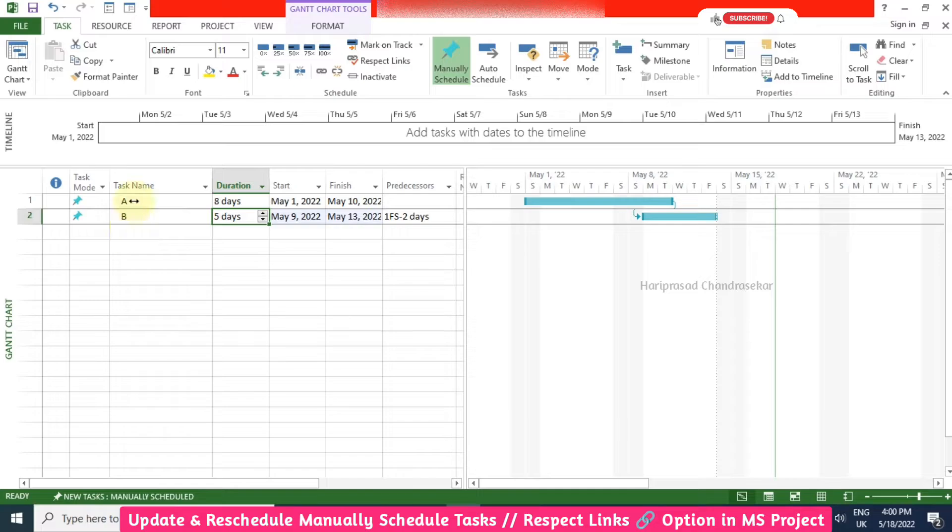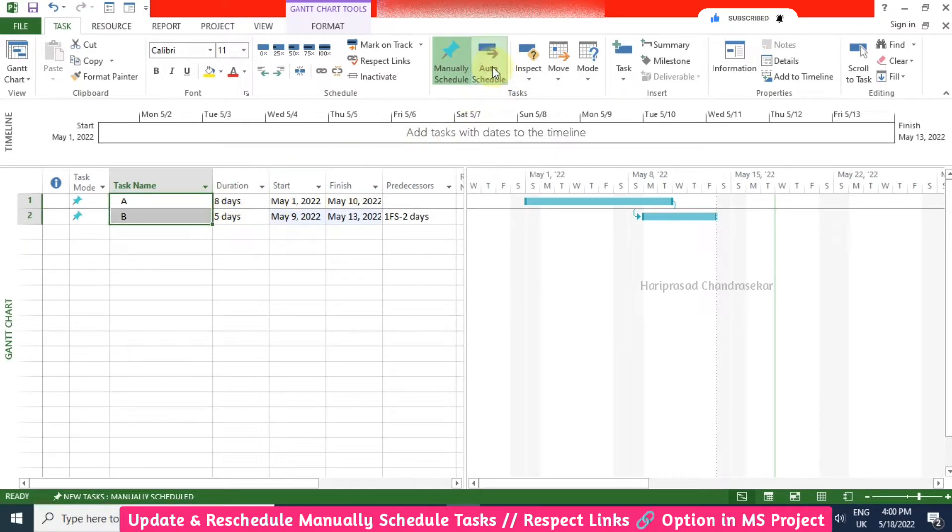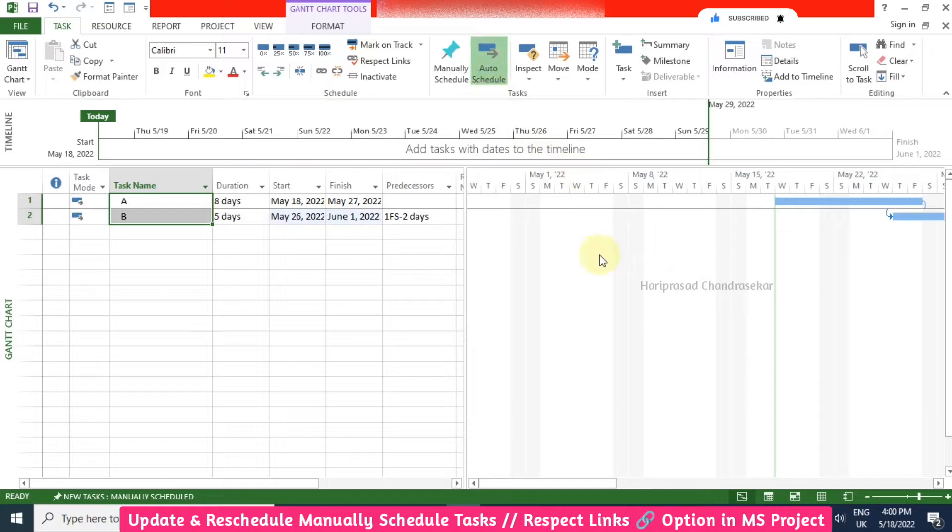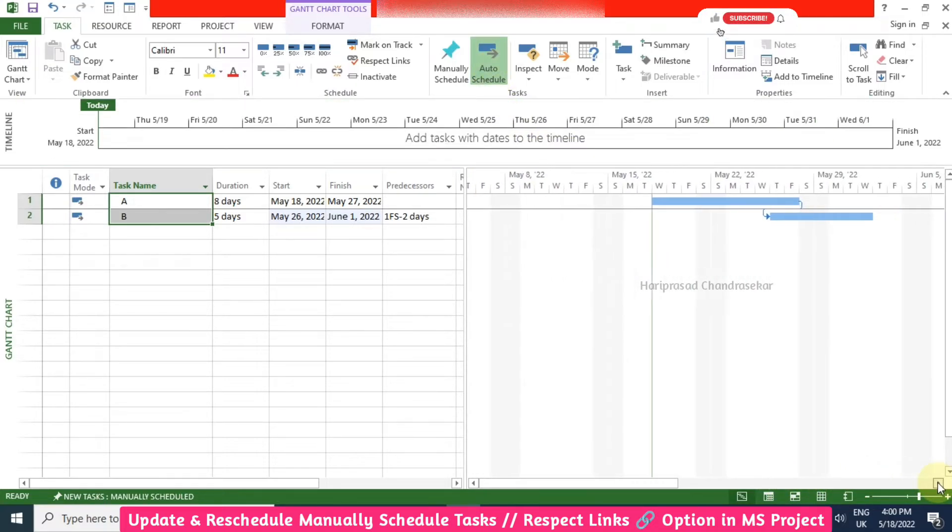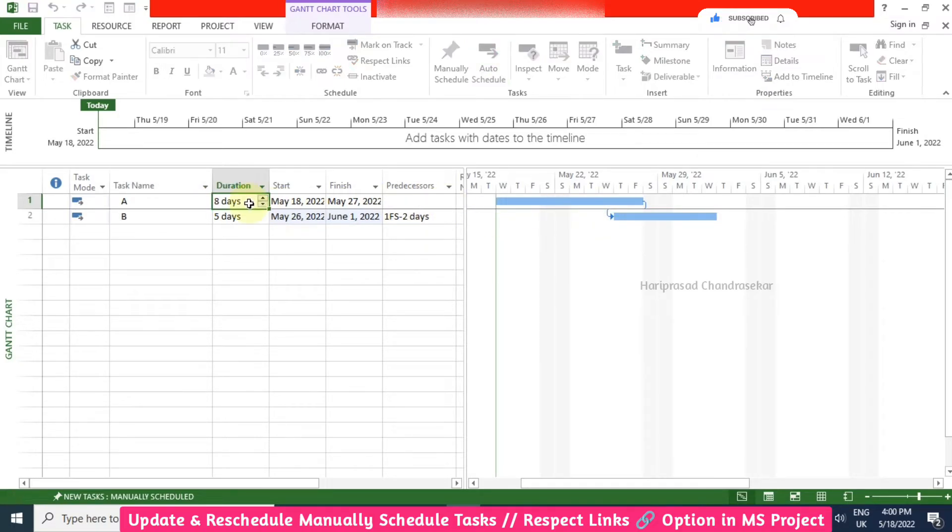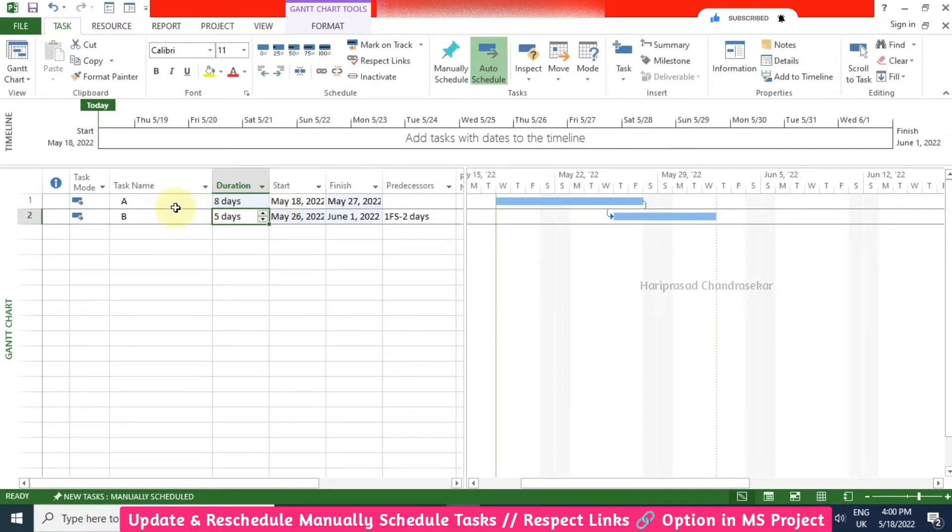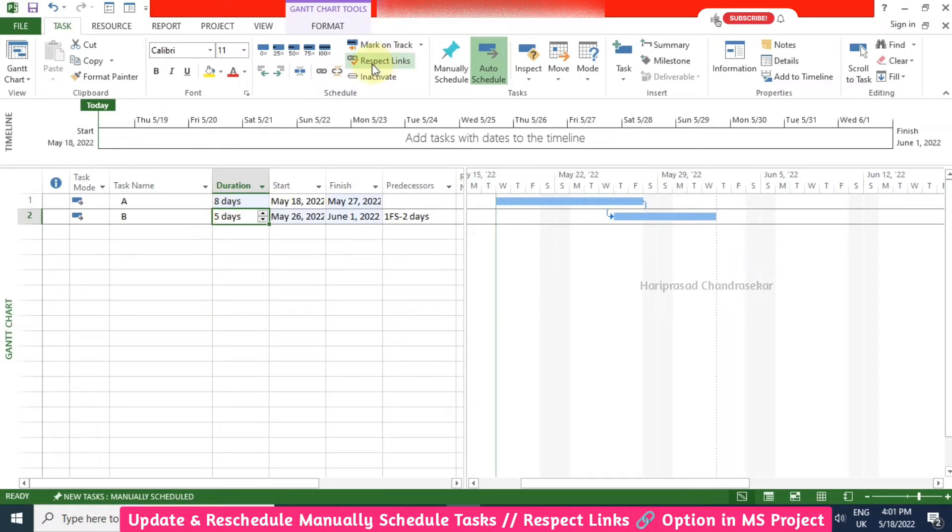If you don't want this headache, then you can put auto schedule. When you are selecting both and putting auto schedule, then it will automatically go to the current date. If you are updating anything it will automatically get updated. That is the difference between manual schedule and auto schedule. This respect links is mainly for manual schedule task.